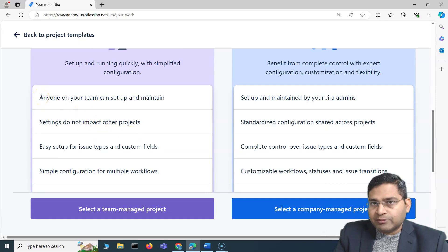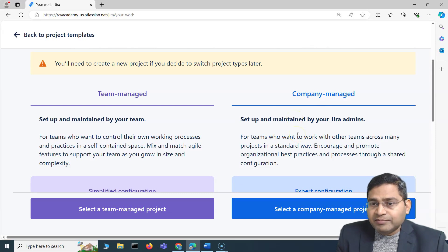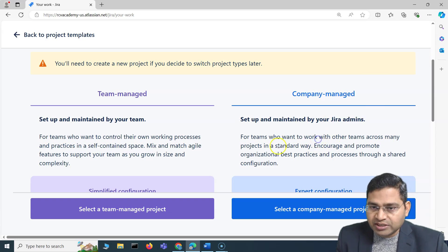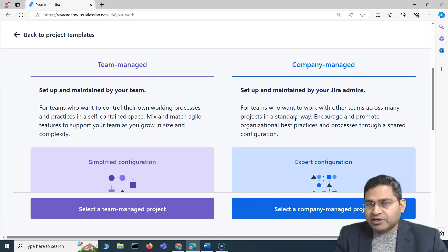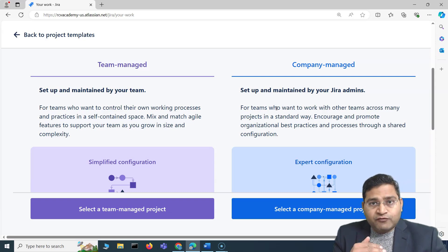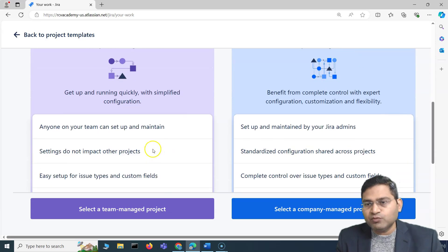You don't have to rely on a Jira administrator to manage a Team Managed project. Company Managed, on the other hand, is set up and maintained by Jira admins. It has advanced capabilities around schemes, and those schemes are shared across all Company Managed projects. If there are 50 Company Managed projects, they all share the schemes defined by Jira administrators. This is used when you want to define and promote organizational best practices — standardizing permission schemes, issue schemes, workflows, and fields across projects.